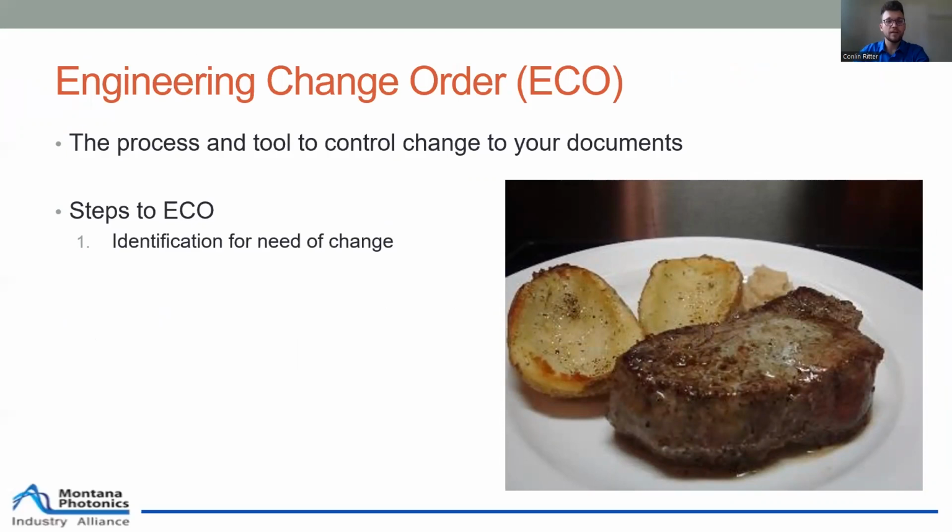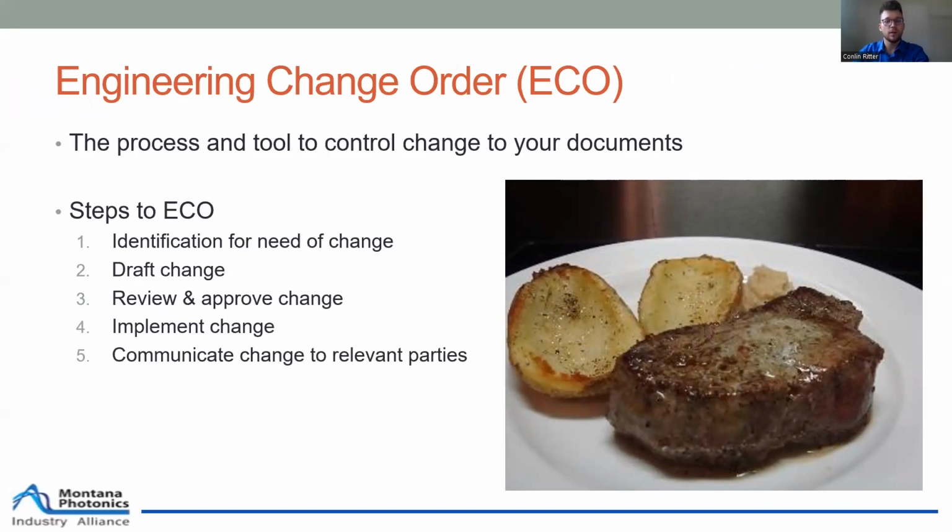First of all, you need to identify the need for the change. Second of all, draft that change, review and approve the change, implement the change, and finally communicate the change to the relevant parties. Now, it may seem simple, these 5 steps may seem simple to you, but there's actually a lot that goes into them. So I'm going to break them down in my next slides.